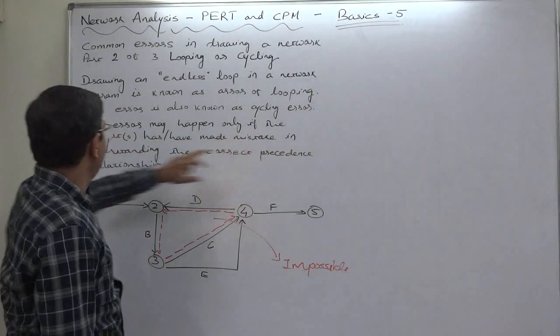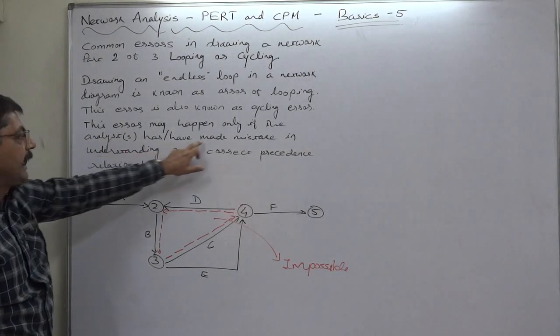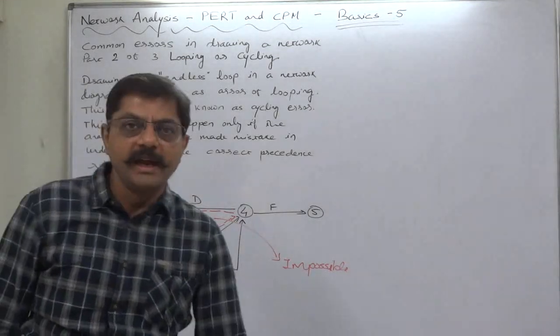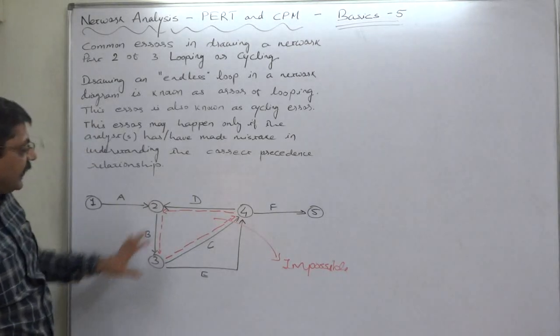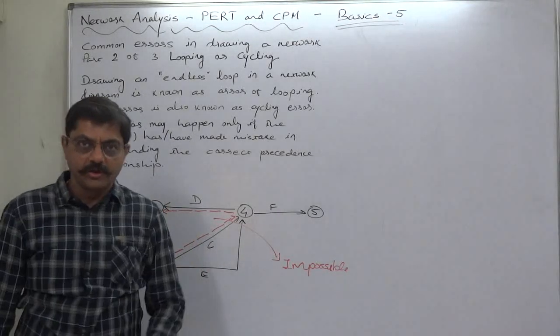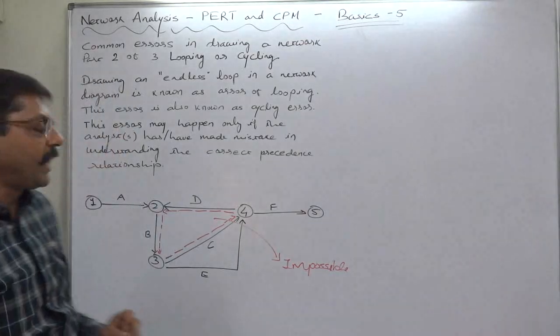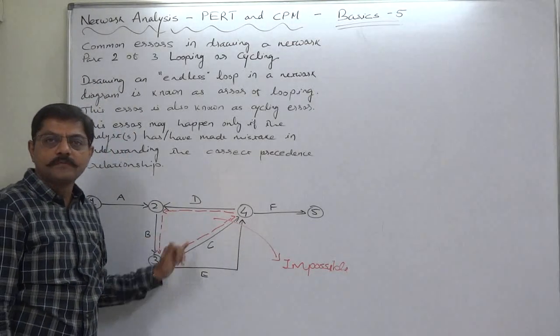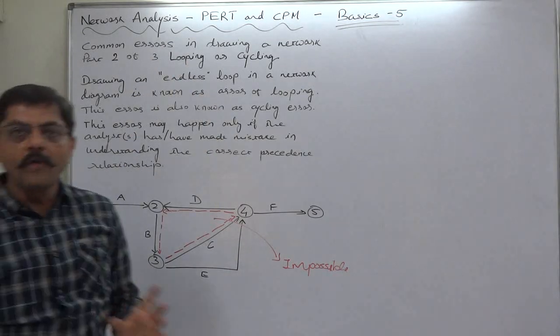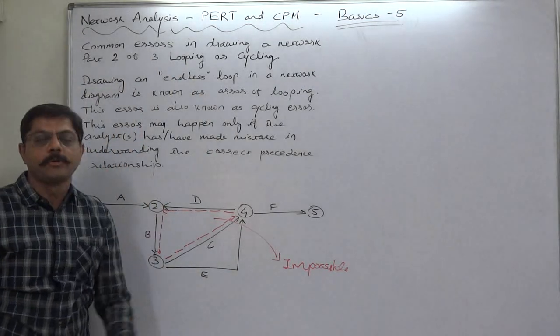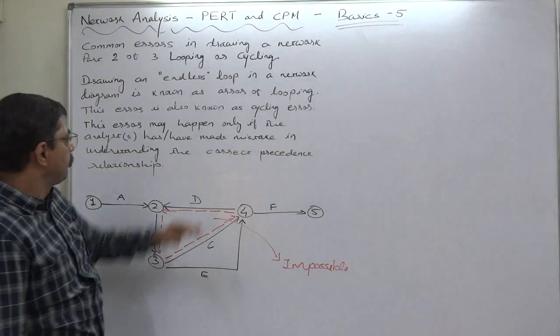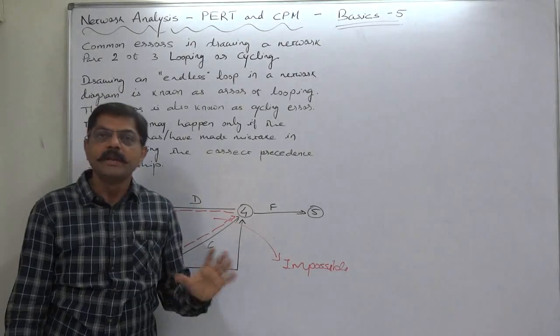This error may happen only if the analyst or analysts has or have made mistake in understanding the correct precedence relationship. I believe that the roots of this kind of error of looping or cycling is not generally in drawing the PERT chart or network diagram, but we can find the root of such kind of error in the basic data of the network diagram or the project where the technicians have explained the precedence relationship between various activities.